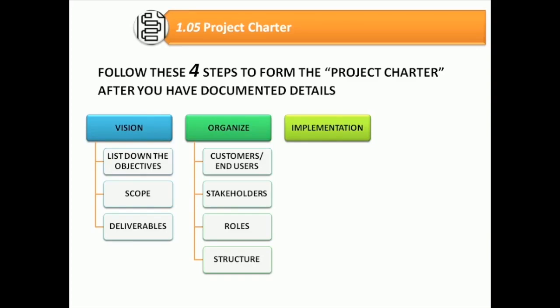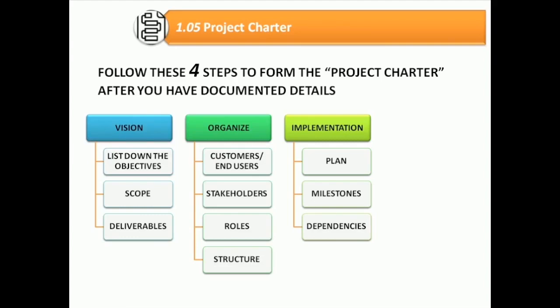Implementation. If you are going to implement, then you need an implementation plan. This will help develop confidence for your customers and stakeholders by listing the phases, activities, and time frame of the project lifecycle. You can use a Gantt chart for this purpose. The Gantt chart will also list down the milestones. Having milestones is an important way to acknowledge the completion of the key deliverables. Dependencies. Tasks or activities linked with each other. That's what we mean by dependencies.